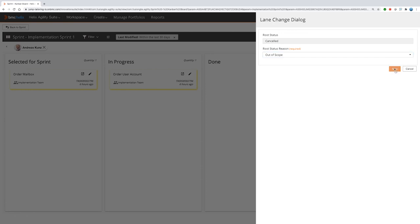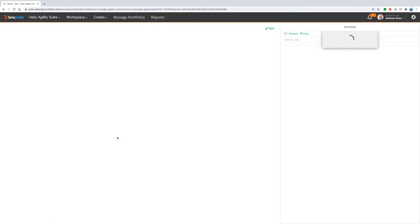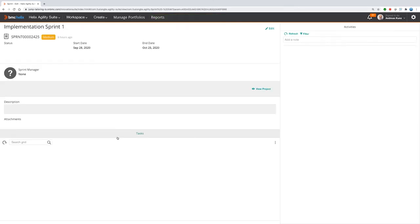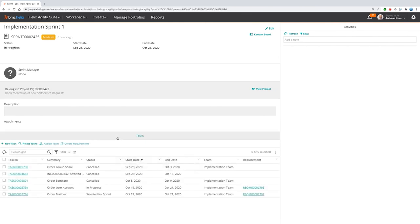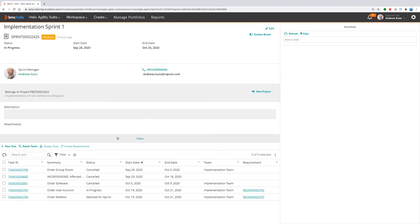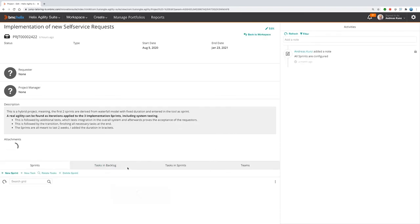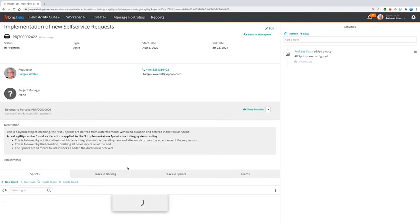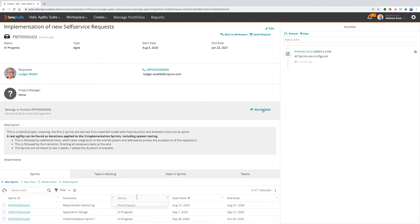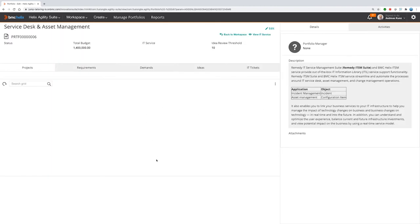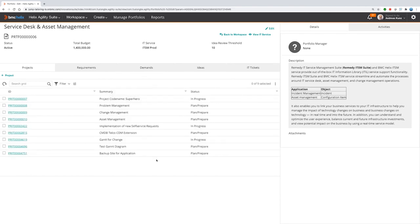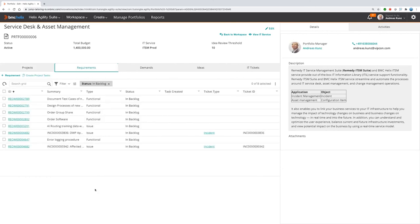While saving the task and getting it out of scope, the system automatically takes care about bringing the requirement out of the project back to the portfolio. So that is the biggest beauty of the application. If you are not able to fulfill something, and you want to see the requirement that was related to that one task, then you will see that requirement back in your portfolio. And if I now have a look at the portfolio, you will see there's a requirement existing that is actually again in the status of backlog and should be implemented in one of the next projects.